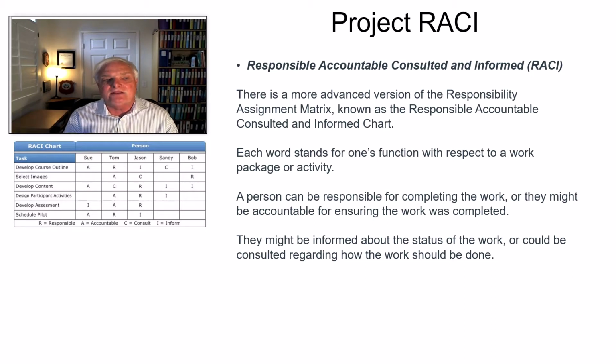The tasks and subtasks are components that are listed in the one matrix coming right below my image. And then you can see that what we've done is we've assigned different people on the team to that. The RACI gives me an ability to understand two different things. One, have I over allocated someone? If I've got someone doing multiple jobs at the same time, this type of illustration would give me the ability to understand that.